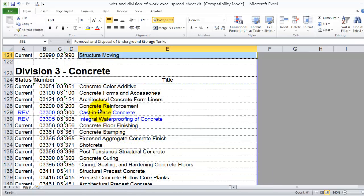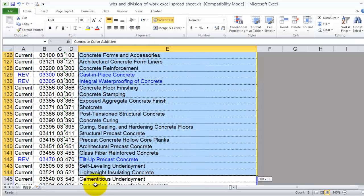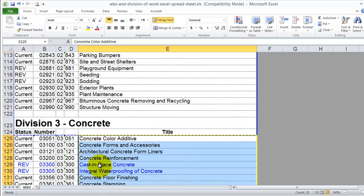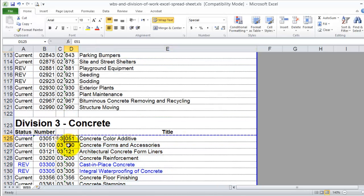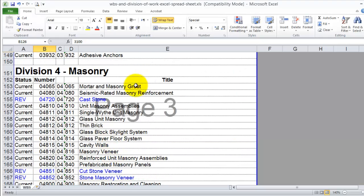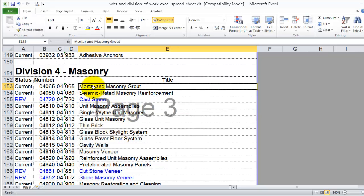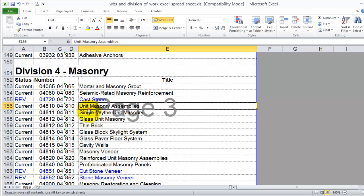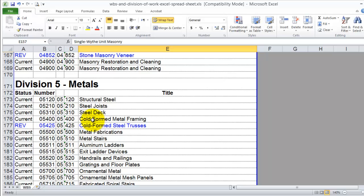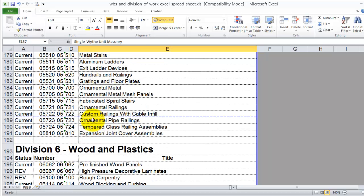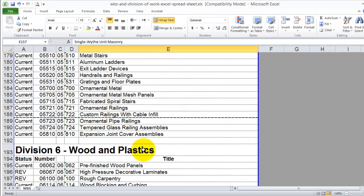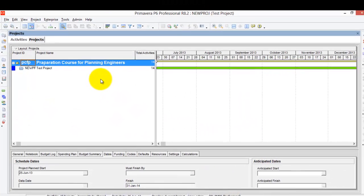For example, for concrete work, it is divided into many subdivisions and you can see the reference numbers here — this is a good reference if you want to use it in your WBS. If you are not sure how to divide the masonry work, you can go to that division, check the subdivisions, and it will give you a good idea of how to divide your division into further subdivisions according to the international CSI system.